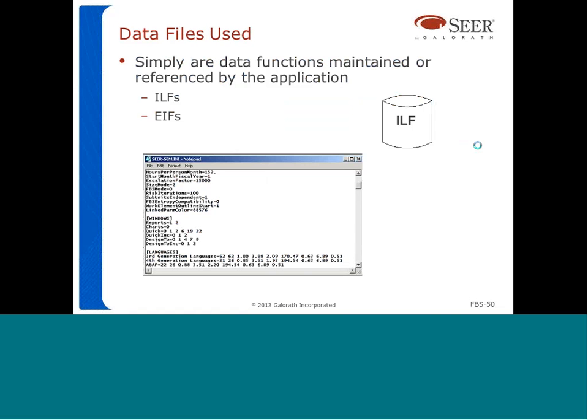So again, data files used are simply the data functions that are maintained or referenced by the transaction. So how many data files are referenced by a particular transaction? It's the number of data files that are referenced or maintained by a specific transaction.